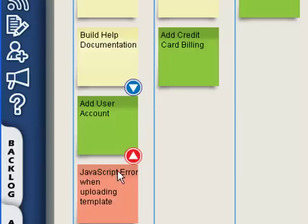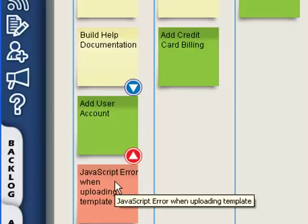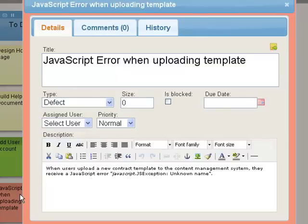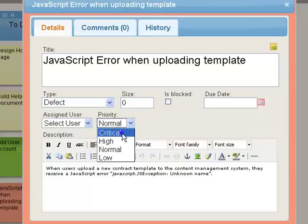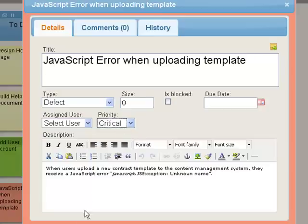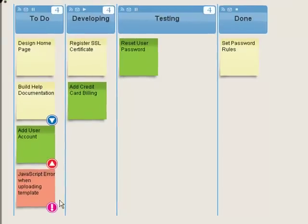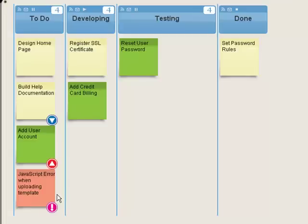Now suppose that we've just discovered a bug which needs to be fixed immediately. We want everyone to make this their top priority. To do this, we open the card and set the priority to critical. When we save this change, you now see an exclamation mark on the card on our Kanban board. This makes it clear to all team members, regardless of where they are located or what language they speak, what they should focus their efforts on.